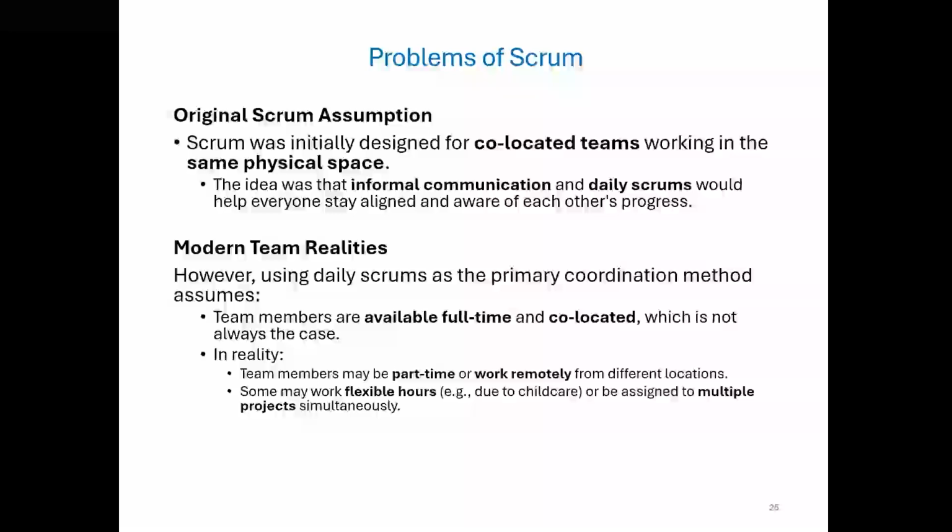So what does that mean for Scrum? Well, it means that relying only on the daily Scrum meeting to collaborate doesn't always work for the team. We have to adapt. We might need to supplement daily stand-ups with asynchronous updates like Slack check-ins, shared dashboards, or team boards in Jira or Trello. The key takeaway here is that while the core ideas of Scrum are still valuable, like transparency, alignment, and communication, we need to adjust how we do these things to match the realities of modern work.